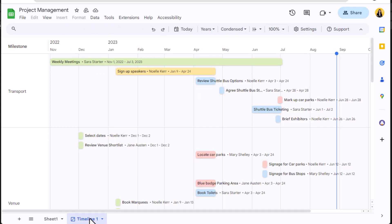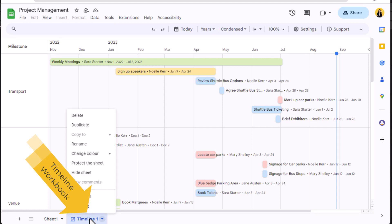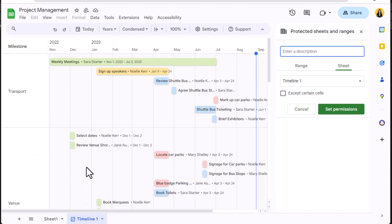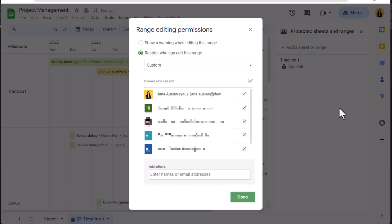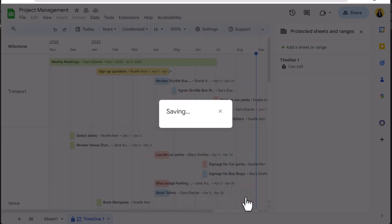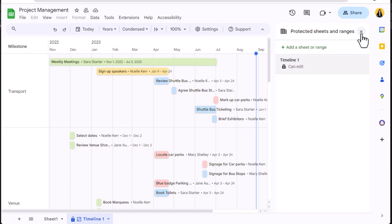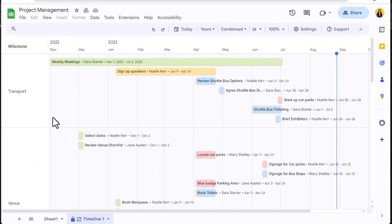Add details or change up the color coding. This can become problematic if users are continuously changing the view. Once you are happy with the settings, right click on the timeline, select protect the sheet, and set permissions to limit editing to yourself or yourself and a small number of editors. In this way, with those not given permissions, the sheet will be visible but is not editable.